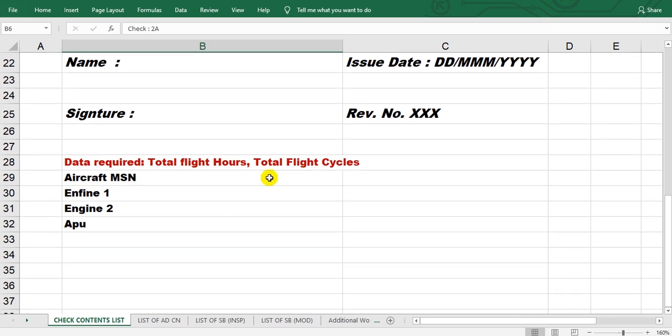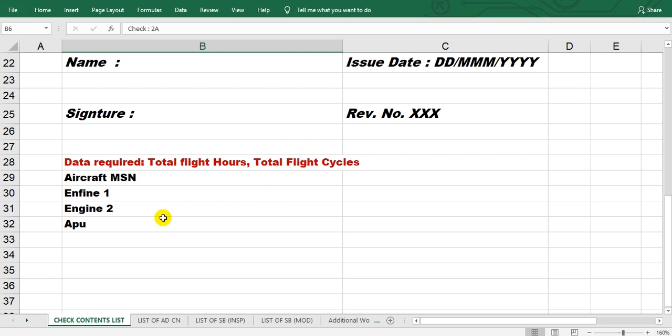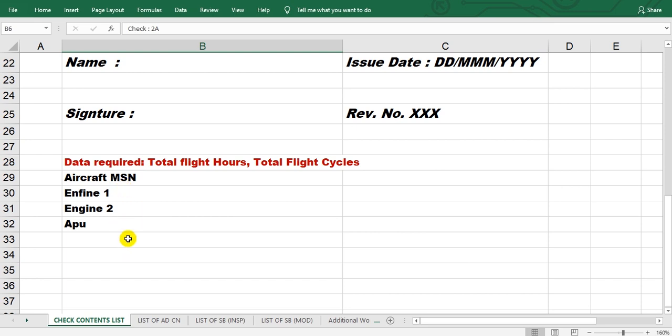Maybe the data required from the airline to the MRO, maintenance repair organization, which will carry out this check. We need the flight hour total, flight hours of the aircraft engines, total flight cycles.